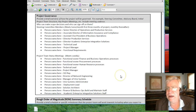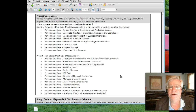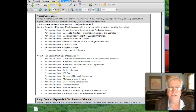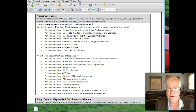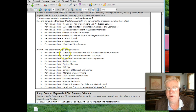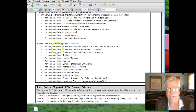Governance: basically, how is the project going to be managed? It was managed by a steering committee meeting monthly, and a project committee meeting weekly. This was the list of those people.